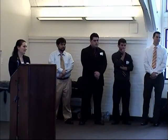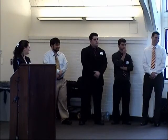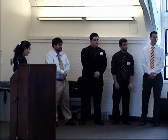Yes? Mr. Sutton. Yes. How are you doing? You buy rebar by weight. Right. They bend it for you. There's no advantage to using the same sizes that you can use in other places on the site. Okay. You just design for what you need. That's what they ship you. Now, it's not like you're going to take a piece out of another wall.